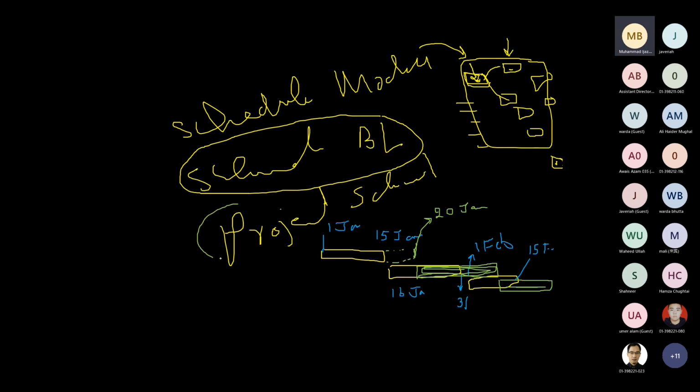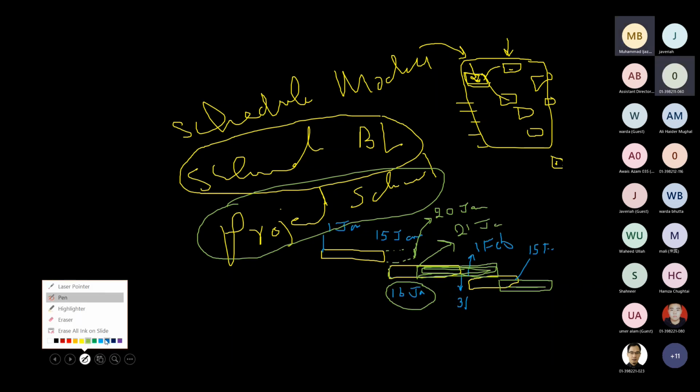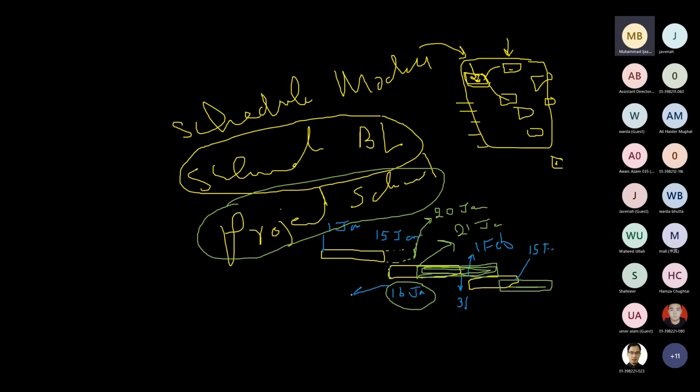Okay. Based on your actual performance now, this activity is scheduled not to start on 16 January, rather it is scheduled to start on 20th or 21st of January now, correct? So according to the baseline, it should have started by 16th of January, but because of the delay in previous activities, its new schedule is now to start on 21st of January. Is it clear?